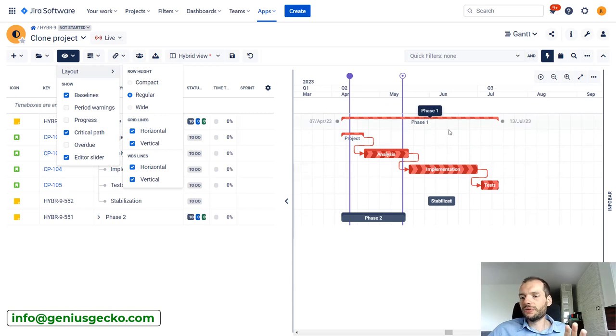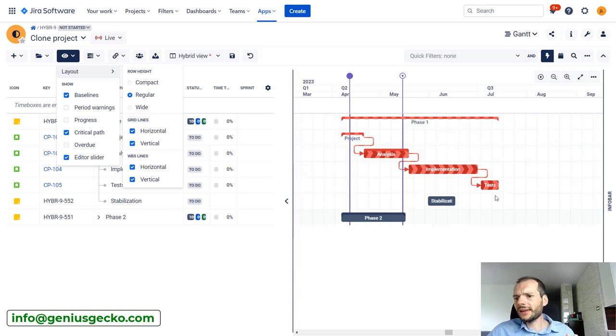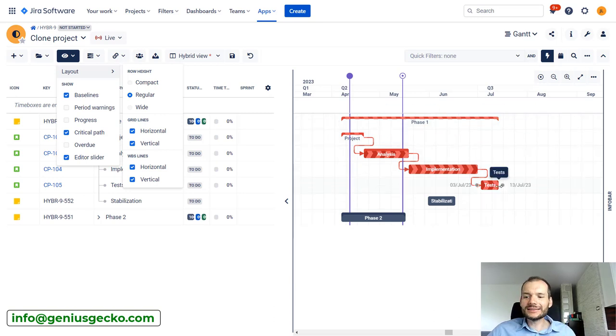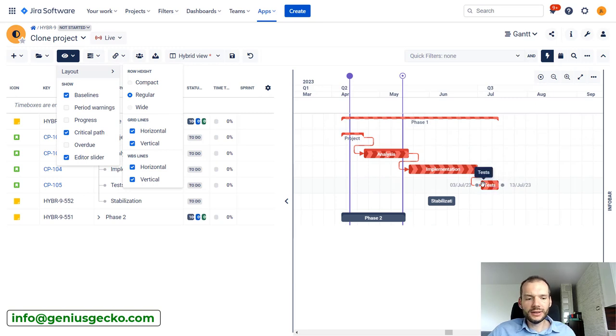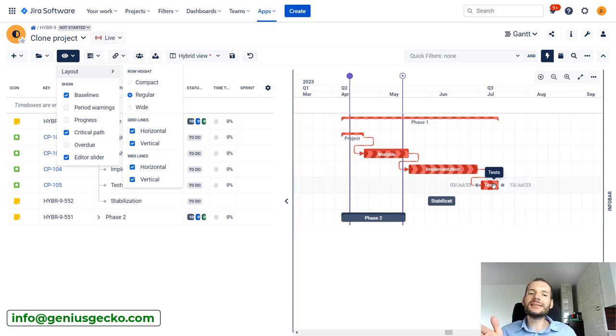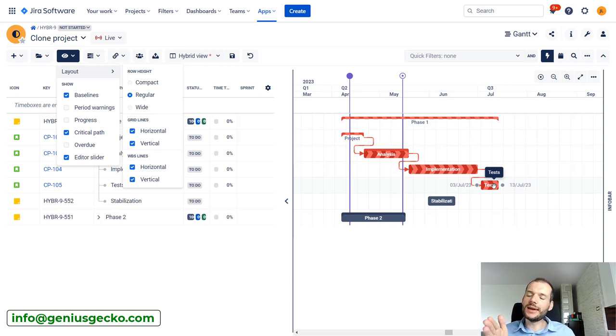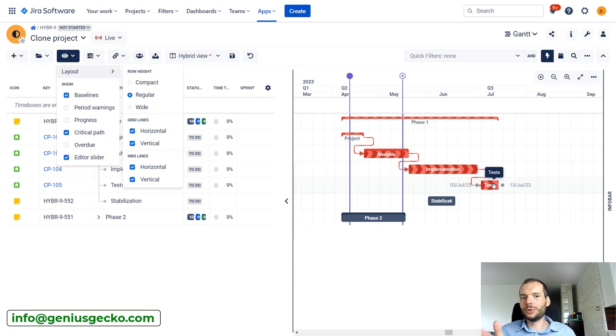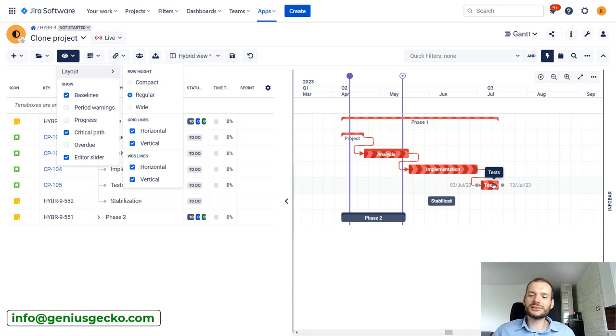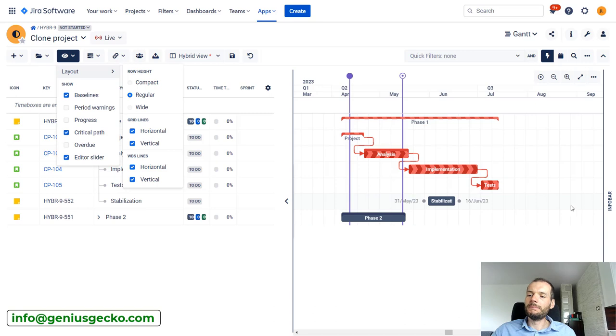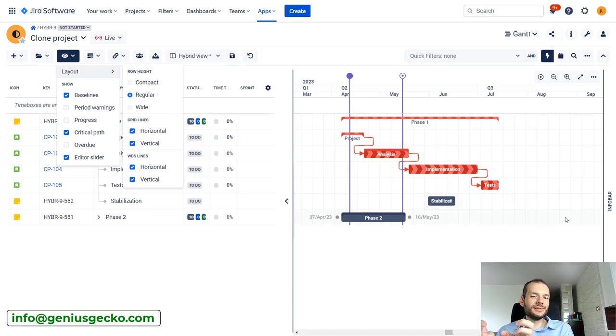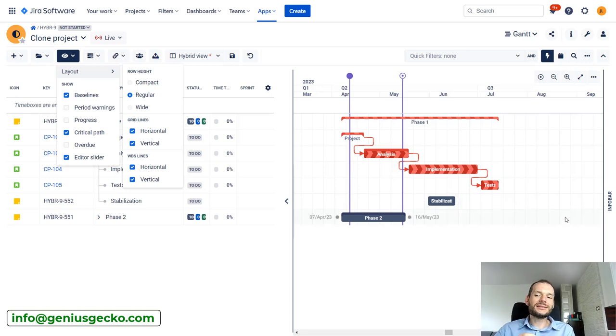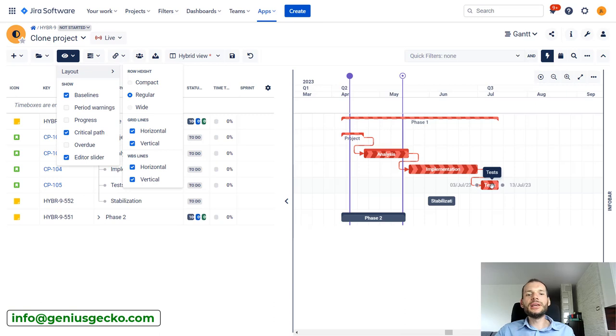And the last task currently that is planned in my box is this Tests task. So basically, the end date of this task is the last thing that will be done within this project, within this box. There is nothing behind that. This is why this task is marked as being on critical path.